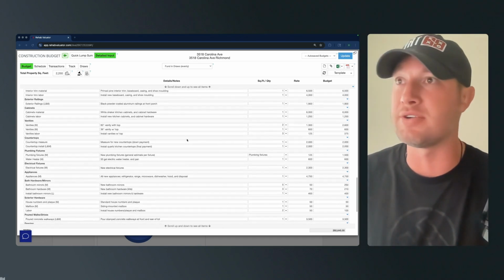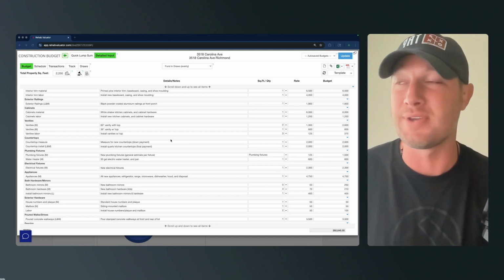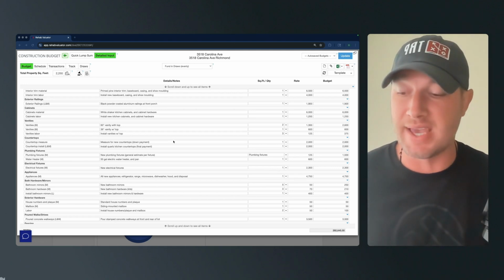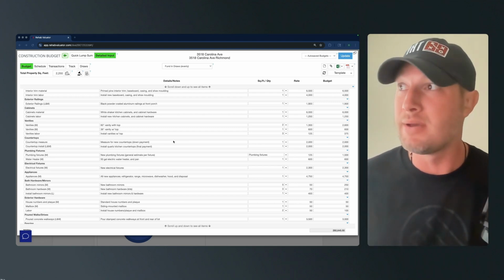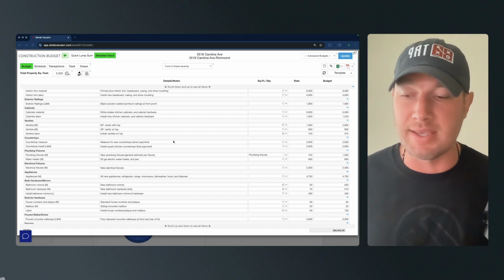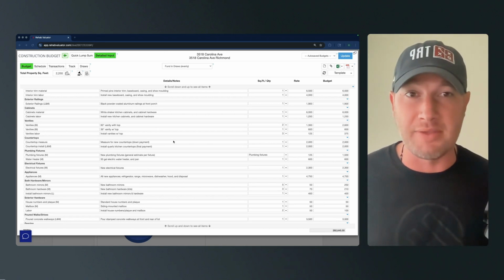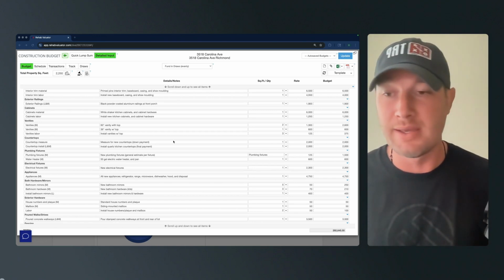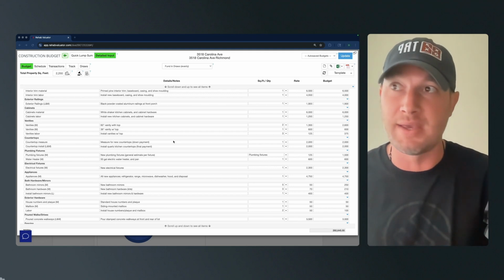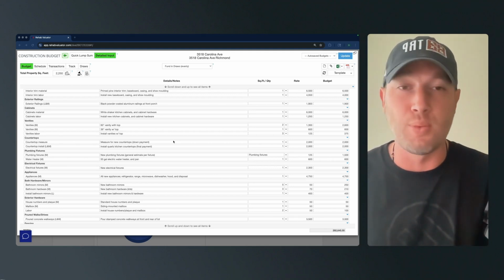Vanities, you're counting. Countertops, I use a lump sum. I know people who try to do linear footage. I don't care to do that either. When it comes to estimating strategy and mindset, again, that might be part of this video now, but for you to get in there and do a measurement of linear footage for countertops, I think it's overkill. I think you can find a good range that you tend to be in. Big kitchens tend to be $4,000. Small kitchens tend to be $2,000. Where are we in this range?